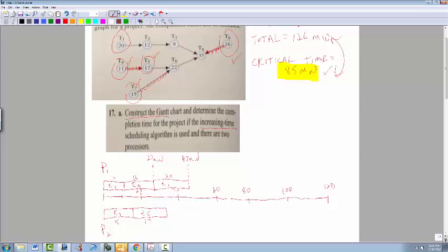These are things you might want to mark as you're going along with this. Well, the problem with this is, so this is done, or being done, and while this is being done, processor 2 gets done with task 5. So now that they're done with task 5 in this process right here, at 32 minutes, this opens up T6, because now T6's precedence relations are taken care of.